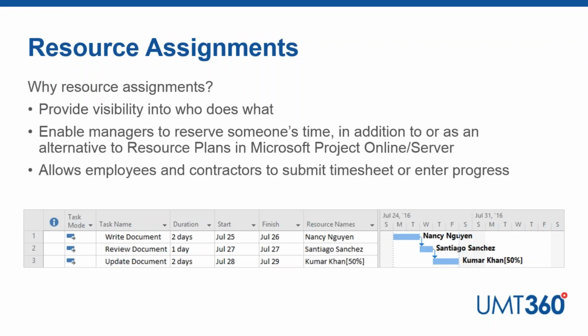Now, in the world of Microsoft Project, you can also assign resources to tasks for the purpose of reserving somebody's time. And in previous days, when resource plans didn't exist just yet, this was really the only way of making sure that you are blocking off somebody's time on everybody's resource calendar. Now, of course, if you're using resource plans, you typically use that to block off somebody's time. But if you decide not to use resource plans, you can basically use this way to reserve somebody's time as well.